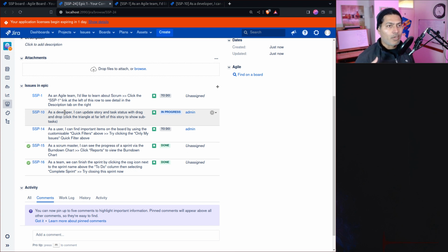At the same time, apart from updating the story point field, you also need to check if a new story is added or removed using the epic link field. So there are different events that you need to monitor, and it can be a problematic situation, because of course you have to monitor these different events, but at the same time you also need to check that you only do this update when story point is updated. So it is technically possible, but it is too much processing.